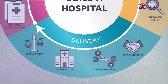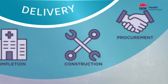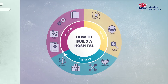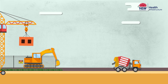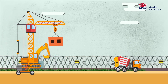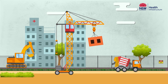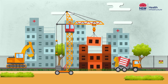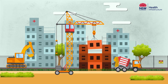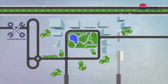This starts by issuing a tender to engage a construction company that can build a high-quality health service on time and to budget. Construction involves enabling work such as installing site fences and site offices, early works such as demolition and installation of in-ground services, and main works which includes building the structure and installing major furniture, fixtures and equipment.